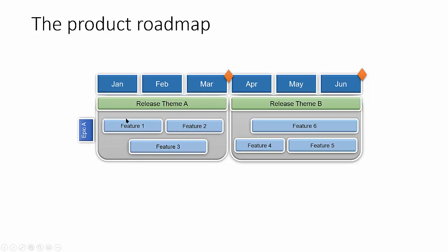The idea is that we will prioritize the most valuable elements in each of the 3 features, work on those, and if anything is not completed by the end of March, it should be the least valuable elements in the 3 features. This is the idea of focusing on value that we were talking about earlier, right?